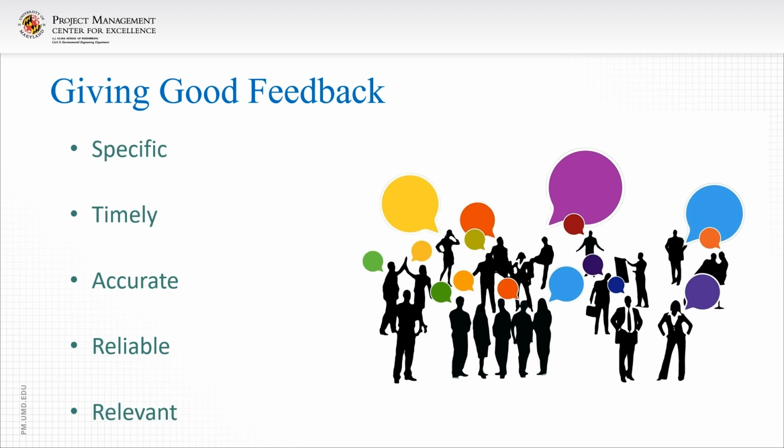And not sure why this person didn't like the color blue, but that's why we have the STAR tool for giving good feedback. Specific, timely, accurate, reliable, relevant.